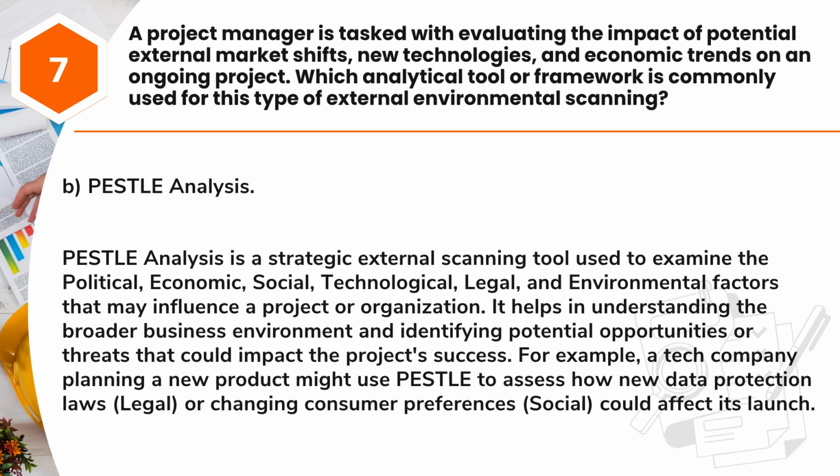Answer: B. PESTLE analysis. PESTLE analysis is a strategic external scanning tool used to examine the political, economic, social, technological, legal, and environmental factors that may influence a project or organization. It helps in understanding the broader business environment and identifying potential opportunities or threats that could impact the project's success. For example, a tech company planning a new product might use PESTLE to assess how new data protection laws, legal, or changing consumer preferences, social, could affect its launch.